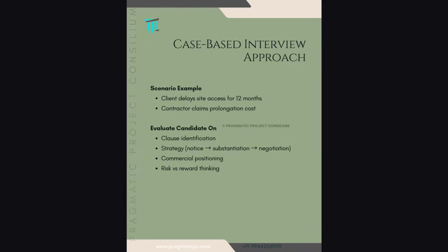Evaluate the candidate on clause identification. What clauses did he identify for a particular delay? Does he depend only on the EOT clause or the variation clause, or does he go beyond that to other employer risk event-driven clauses and their direct consequences? Is he speaking strategically about notice, time-bar clauses, evidence or substantiation, and negotiations? What will be the commercial positioning, and what is the risk versus reward thinking?